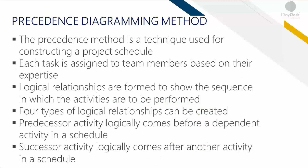The Precedence Diagramming Method, or PDM, uses what's called the precedence technique. What that means is: if you have a task that is dependent on another task and you set the PDM, the previous task must be completed before you can do the subsequent task. It's like a waterfall approach — step by step. Task one needs to be completed before you can do task two, and task two must be completed before task three. I want to demonstrate that hands-on so you get the concepts clear by looking at the application, not just the concept.